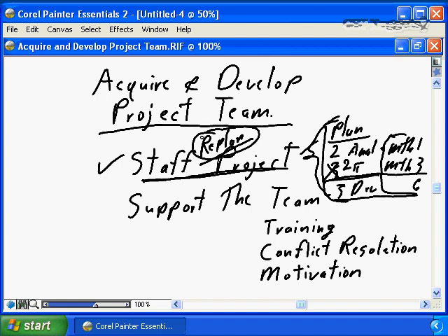You simply don't take the bad news and say, well, I guess I'll do my best. I wanted 3 experienced analysts. I only got 2 junior analysts, but hey, I know we'll still deliver the project on time. That's unrealistic. If you don't get the staff that you expected, go back and replan.